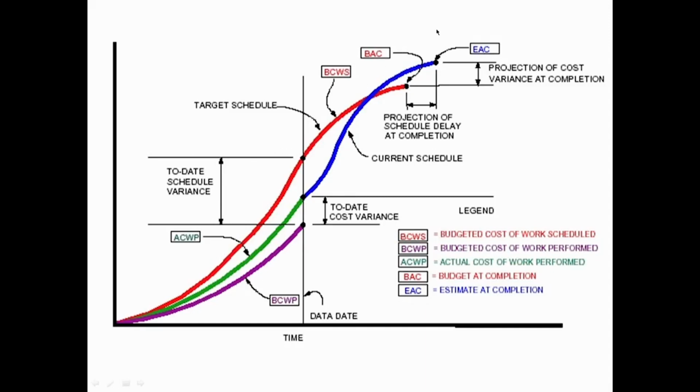And when we forecast from this, we looked at a basic way of estimating completion, and the budgeted completion here is what we had originally budgeted. We looked at how estimated completion can be obtained, and based on this you can calculate the variance of the total project cost at completion. Almost all the terminology we have discussed is shown in this figure. Here we have the variances, the schedule variance and the cost variance, and based on these two we have the schedule performance index and the cost performance index.